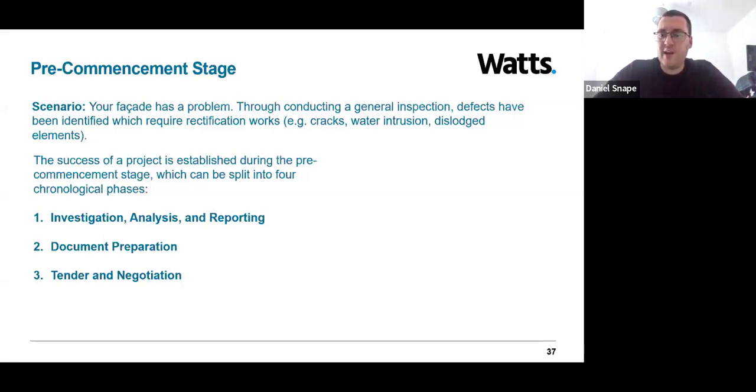I guess in addition to that, before issuing invitations to tender, the employer's requirements and works information should be airtight. So tender returns will typically only be as good as the information a contractor has based it on.